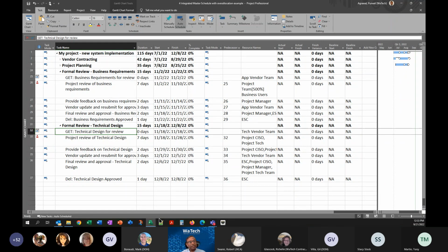If the tasks are running late, that special resource, the subject matter expert, may already have been assigned to complete another activity, either on this project or on a different assignment within the agency. So when you have the schedule with tasks linked, resources assigned and allocated by dates and durations, you have multiple factors to show you what a delay might mean to your project as a whole.